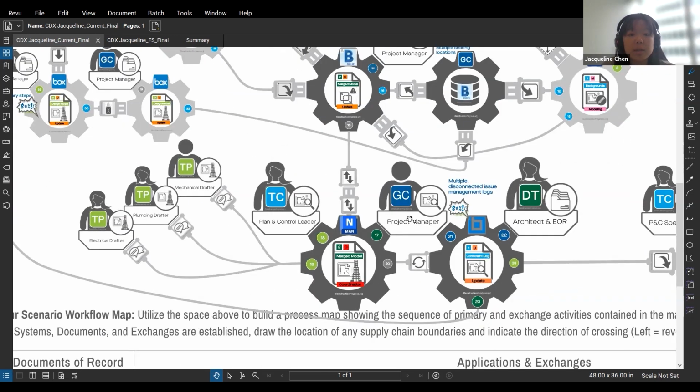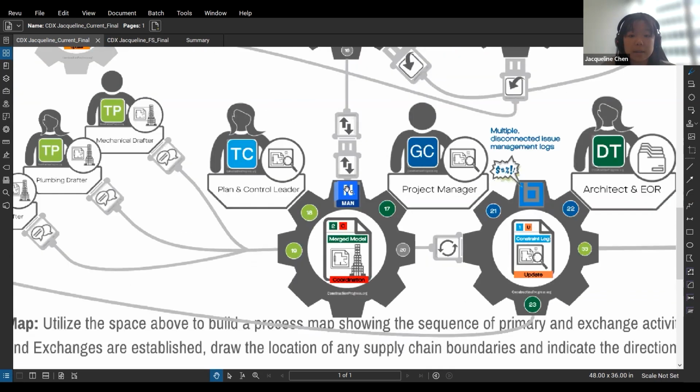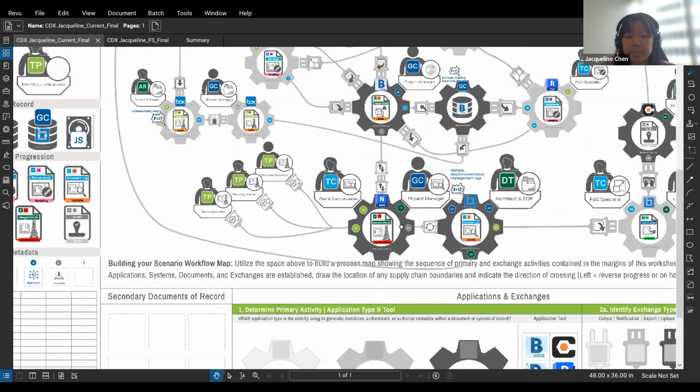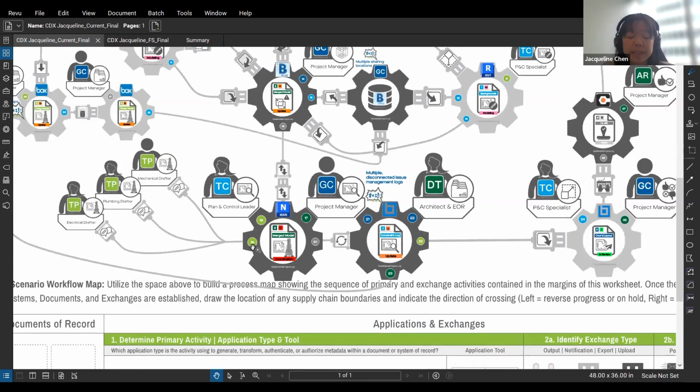Navisworks is a program where coordination is happening with the general contractor, the trade partners, the MEP subs, Planet, and everyone. And all of the issues and coordination logs that are found in Navisworks are tracked in a Bluebeam session that the architect and engineer of record, otherwise known as the design team, is part of.